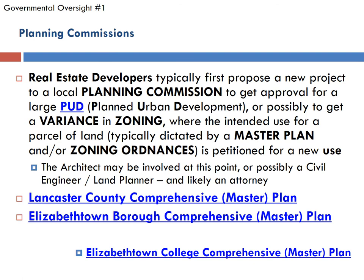We're going very fast through this and I expect students to come back and drill down into each of these things. Although when I present this in person, we'll go very slowly through all these things. The real estate developer is the main person raising the money and getting the funding. They have to deal with planning commissions at the county or local level. There are links to Lancaster County and Elizabethtown Borough. They may need a variance if they're proposing something that deviates from standard land use ideas for a particular area. There's also a link to the Elizabethtown College Master Plan.